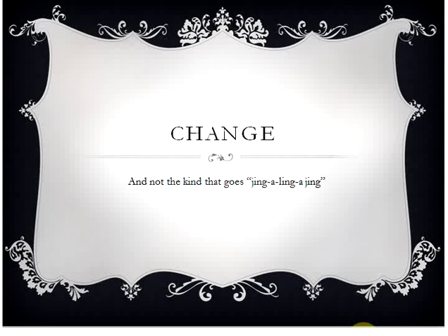and to mitigate some of the silly change requests. So let's say this nurse doesn't like the order in which their assessment is laid out and wants to do it this way, but another nurse disagrees and thinks that this item should be first in the list. Something to that nature. This super user or SME should be able to have that conversation at that level and understand the change management, change control process to help communicate to those users how long the process will take, potentially some other areas that would be involved, and come up with a good plan for that single person, the SME, to bring it to the larger change control meeting.